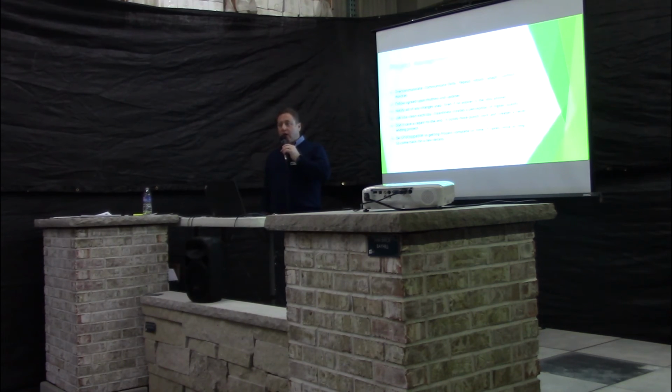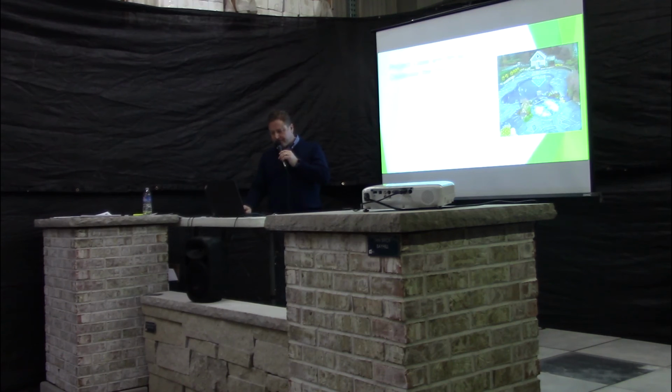I'm going to call in some help. Hey, I'm going to call a competitor and see if one of his guys can get over and help us, because we're going to get this thing done, because we got this project we're starting on next Tuesday. And it's really critical to do this. If you start piling up a bunch of projects that aren't finished, it becomes a complete never-ending spiral, and it's very difficult to dig your way out of that.